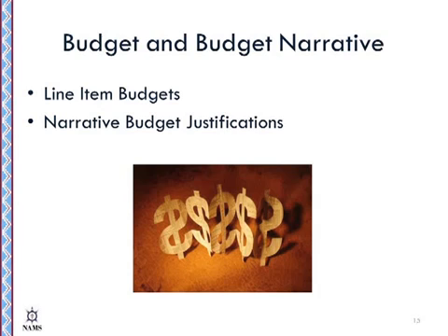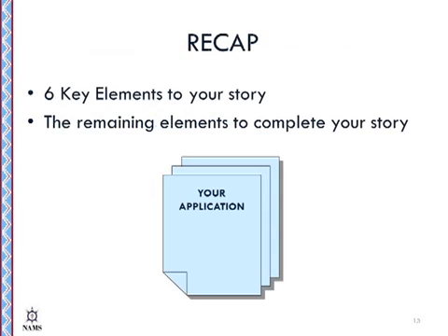Conversely, make sure that you budget for everything that you discuss in your narrative. Are you attending a conference? Did you include the cost in your budget? Are you sending out a survey to the tribal membership? Did you include the cost of postage? It's always a good idea to have someone else review your budget for calculation errors and omissions.